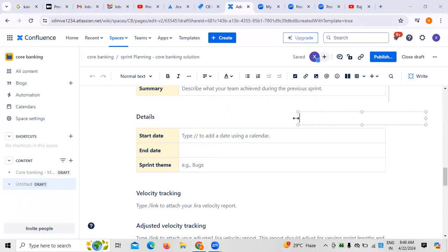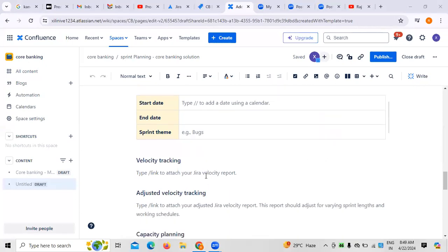When we are implementing in Scrum, first is theme, next is epic, next is story, I mean to say user story, task, subtask, right? So this is the process: theme, epic, user story, task, and subtask. This is how generally the process has to be followed. So this is where we need to mention the sprint theme, all that.